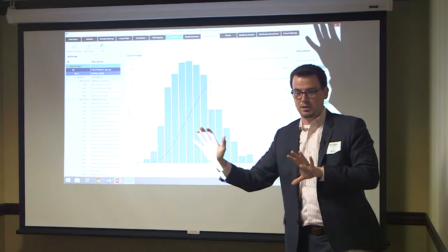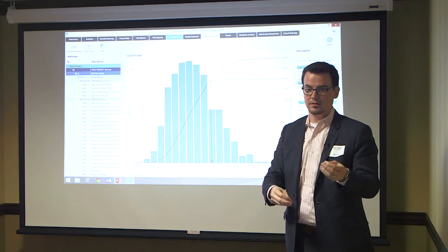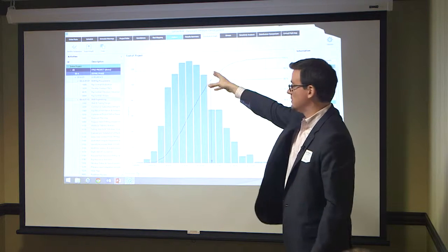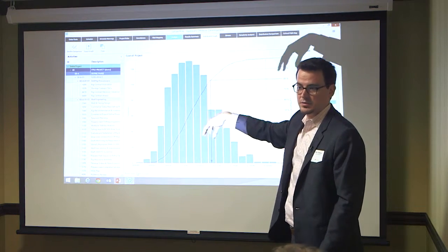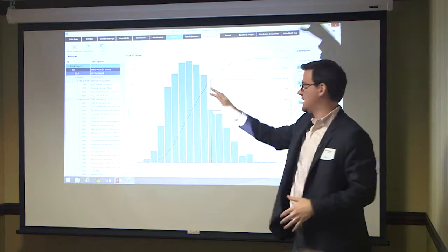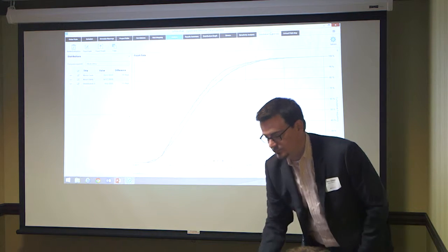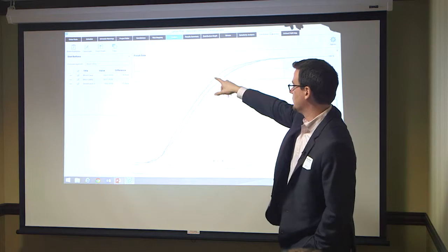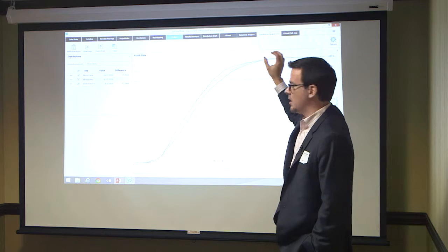Part of this process may be that I have to go back and change my schedule, introducing different or new activities to represent strategies to mitigate those risks. I can do that because I've got my schedule here. So I can go back, modify my schedule, and say, if those risks change in this way, rerun it, and capture that story here and report it out. All of these charts and graphs can be exported out. You can take the images and export them out right now.